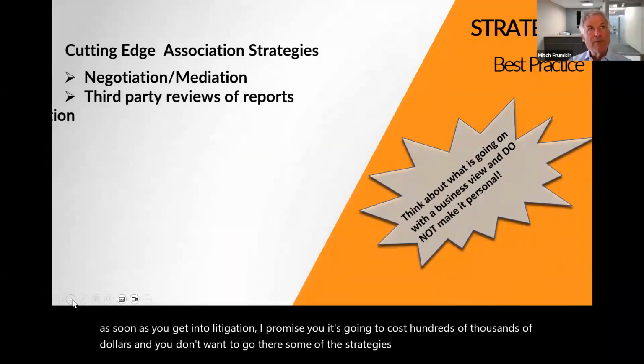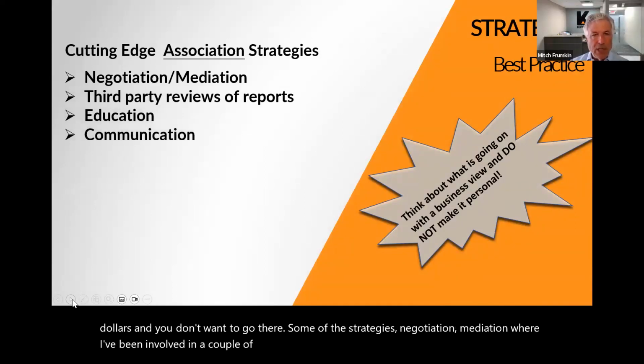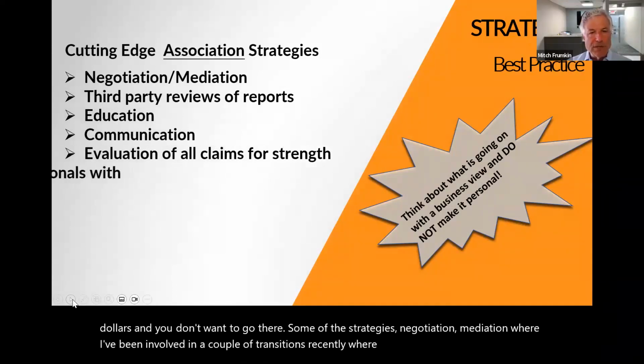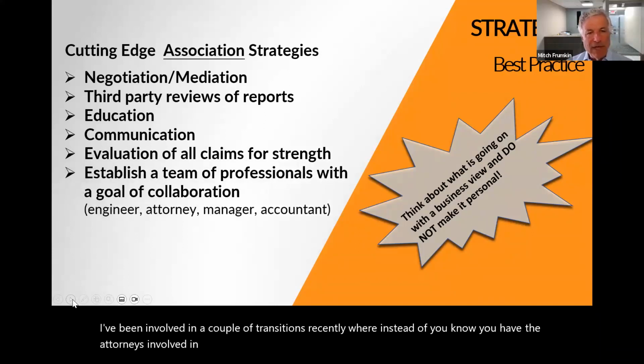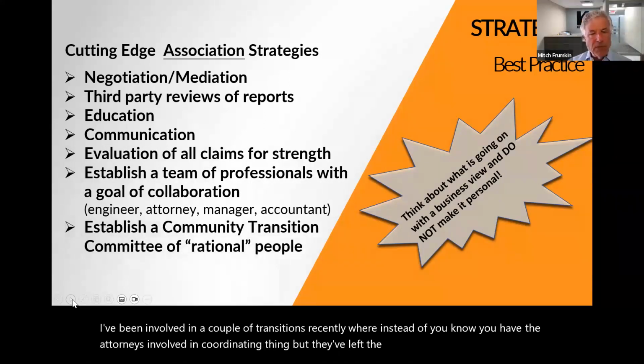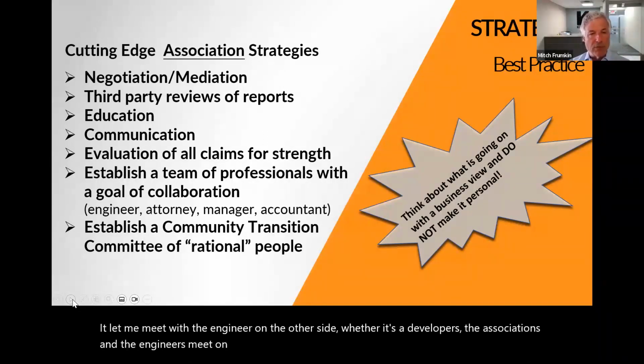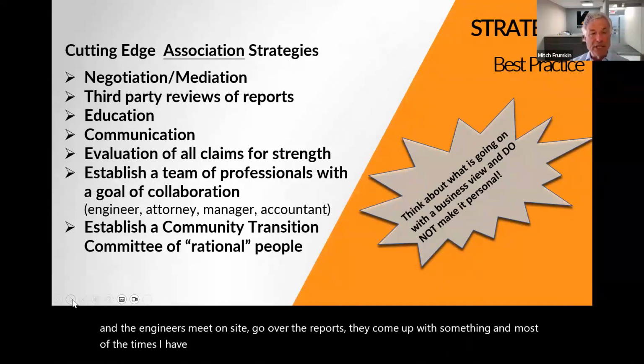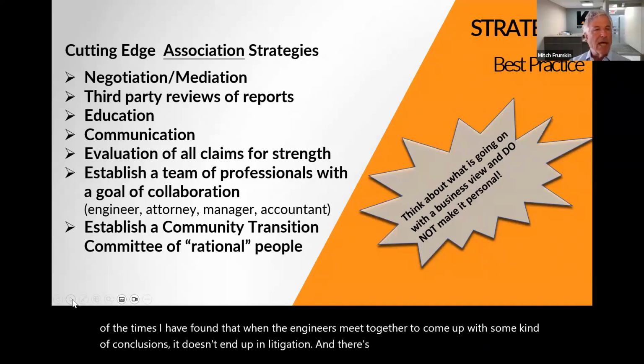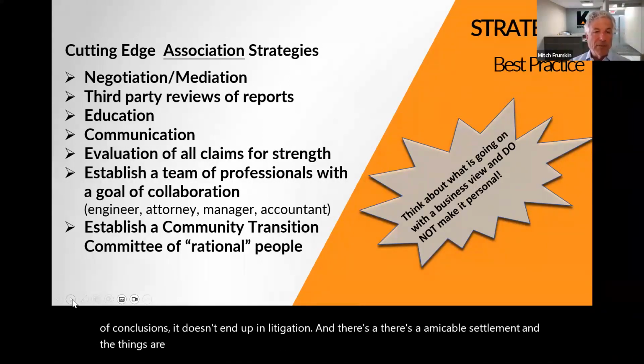negotiation, mediation. Well, I've been involved in a couple of transitions recently where, you have the attorneys involved in coordinating things, but they've let me meet with the engineer on the other side, whether it's the developers or the associations, and the engineers meet on site, go over the reports, and they come up with something. And most of the times what I have found is that when the engineers meet together to come up with some kind of conclusions, it doesn't end up in litigation and there's an amicable settlement and the things are taken care of. So you may want to consider that.